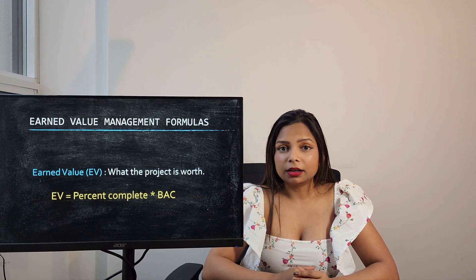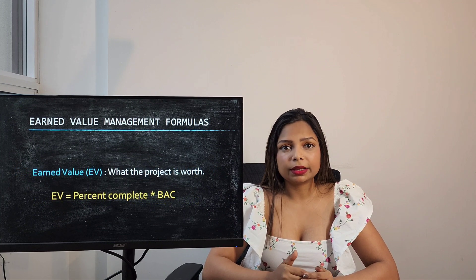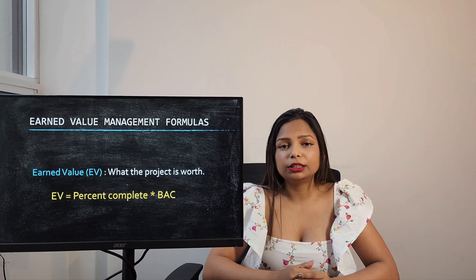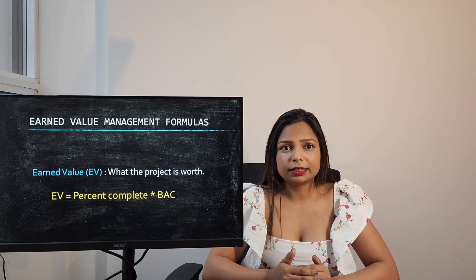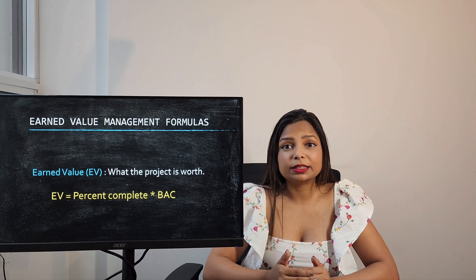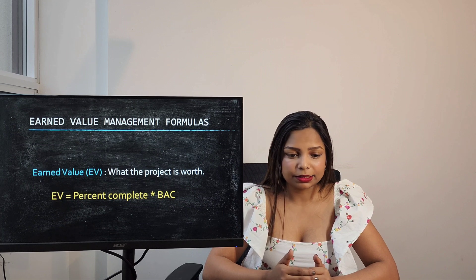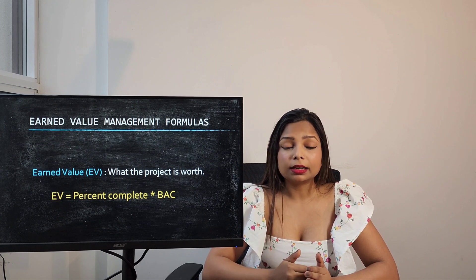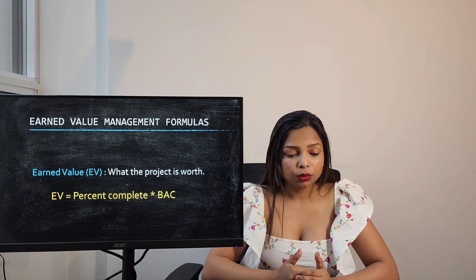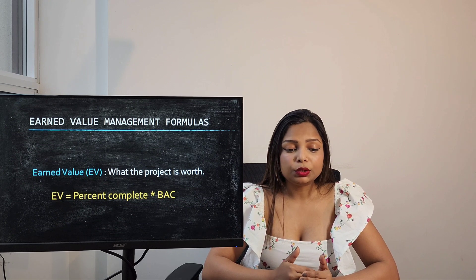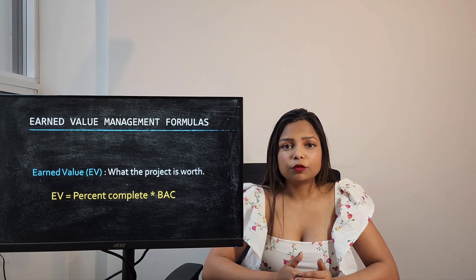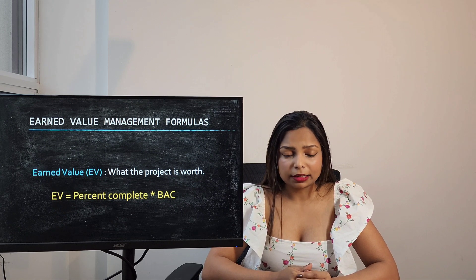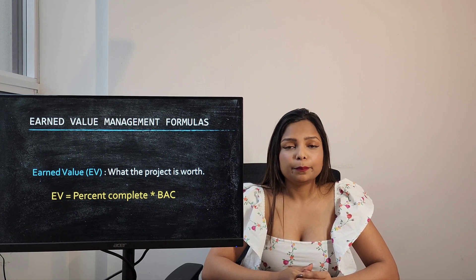The next term is Earned Value. Earned Value is the approved budget for the project that was actually completed by the specified date. To calculate Earned Value you need to know the percentage complete and then multiply that with BAC.